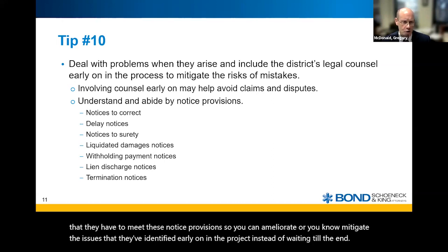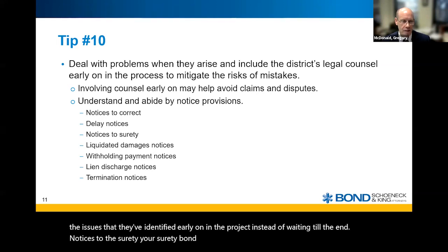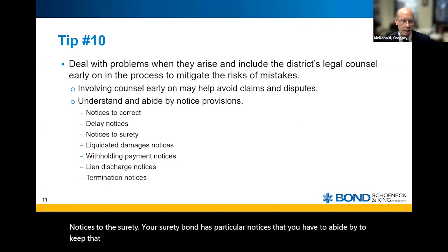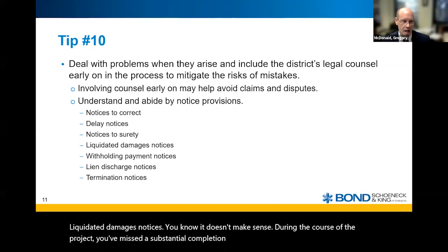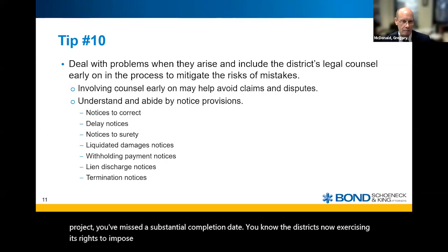Notices to the surety. Your surety bond has particular notices that you have to abide by to keep that bond in play. Liquidated damages notices. It doesn't make sense during the course of the project to say you've missed a substantial completion date. The district's now exercising its rights to impose liquidated damages and give them notice of that.